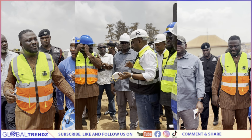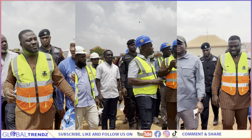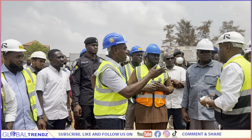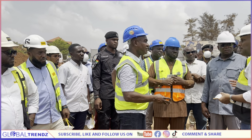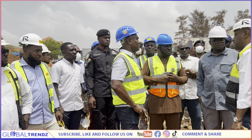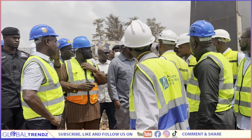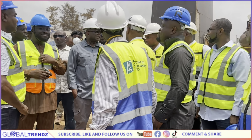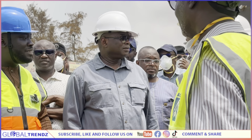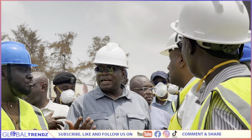We are discussing with the subcontractor. He needs them like 24 hours of continuous cut of supply. 48 hours. And there will be absolutely no water. That's a challenge. Yes. Do a lot of communication, because we keep kicking the can down the road. But it has to be done. It has to be done.